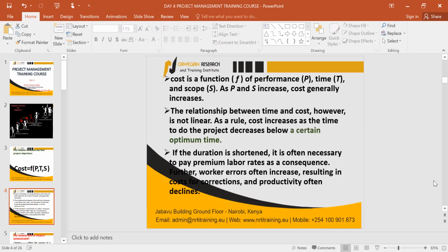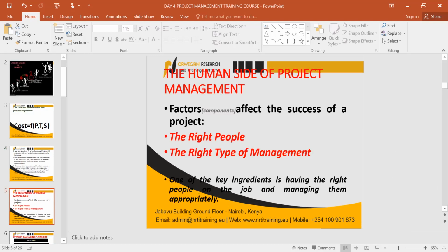So as you are pushing things in a hurry, productivity declines. That is the general rule. And this productivity declines because people are fatigued, people get sick, worker error rates increase, and quality declines. So in the process of this, things done in a hurry are not actually producing the best outcome. That is what the mathematics is talking about.